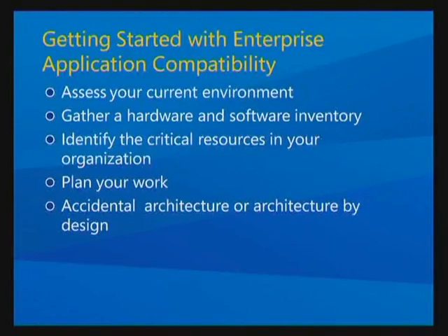So oftentimes people look at their Windows Vista deployment and they say, well, I have $24 million to deploy these 27,000 seats, and 9 or 10 million of that has to go to application compatibility. Why should I upgrade? Well, I think we need to look at those costs realistically. It is an expensive project, but it's also a project that can take you not only to Windows Vista, but prepare you for the next 10 years of computing when you need to think about things like SOA and your web apps and take you into that next phase.